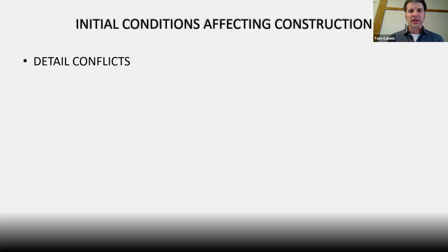So for masonry, a lot of what we deal with in pre-construction is understanding design detail conflicts, section views, plan views, elevation views that are in conflict. This requires time, RFIs. It sometimes leads to things being built incorrectly. It's a result of deconstructing in the design process.